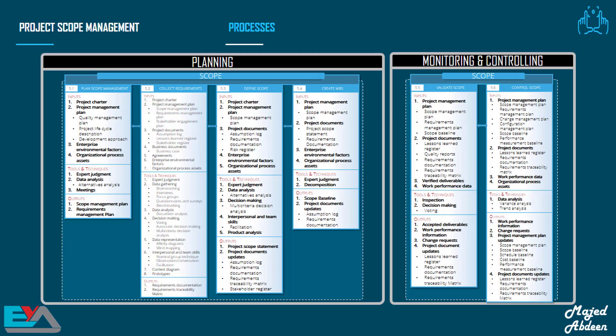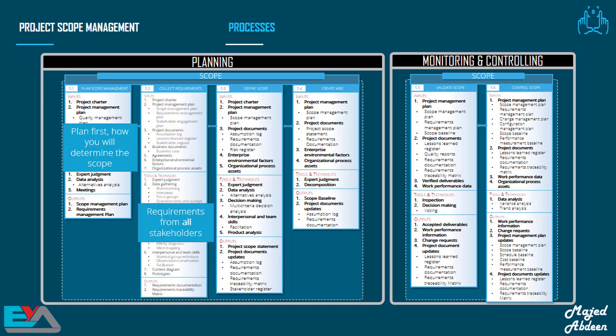In Scope Management, we have 6 processes, of which 4 processes take place during the Planning process group, and 2 processes take place during the Monitoring and Controlling process group. When you get to the exam, remember these points. First, you must plan how you'll define the scope of your project. You also have to plan how you'll manage and control the scope — that means you will plan how to execute all the other processes. This is part of your Scope Management plan, and this concept is implemented in all the other knowledge areas.